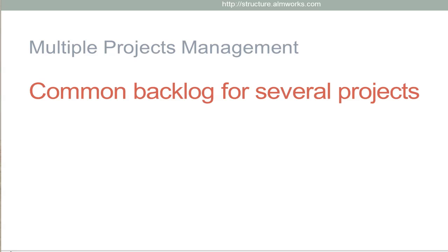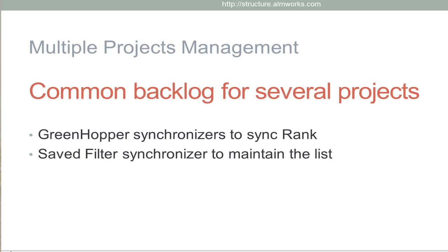So one example of what structure can do in this case is a common backlog. Imagine there are multiple customers, everybody files issues in JIRA in their own project, and you need to somehow prioritize these requests. You cannot do that in Greenhopper because those are different projects. So this company can use structure to add these issues all into the same structure and prioritize there.